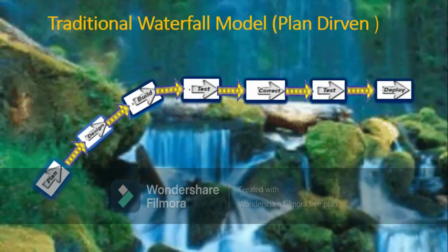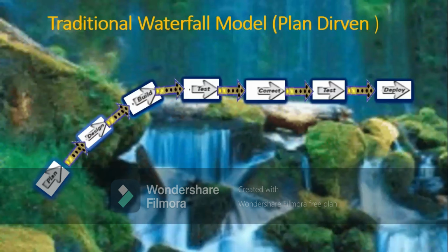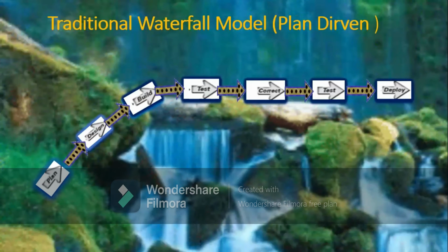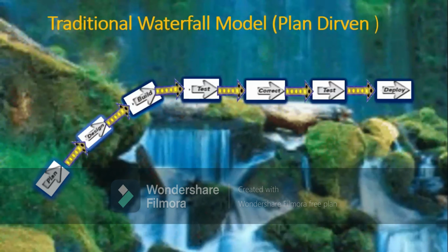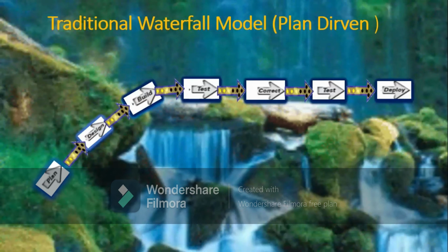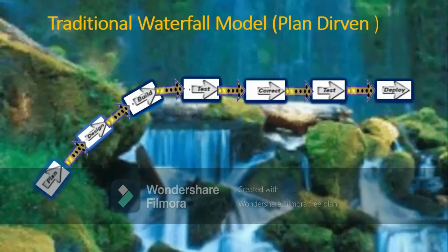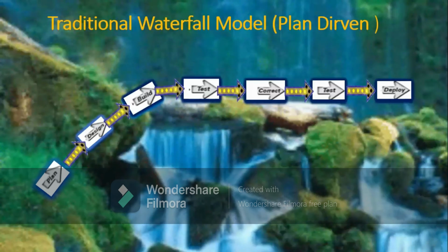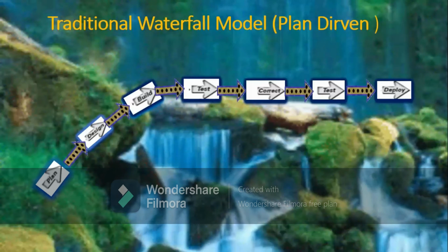Today, we're using the hybrid. We might use traditional waterfall in the first part, the first release. In the next part, I'll be using Agile. Let's say the requirements are known at the beginning, but at the end I don't know how another module is going to be integrated, so I don't have information about it. So I will use Agile. But for the first part, I will be using traditional waterfall, the sequential, right? The spiral technique. So they're all perfect. Today, we're adopting the hybrid.